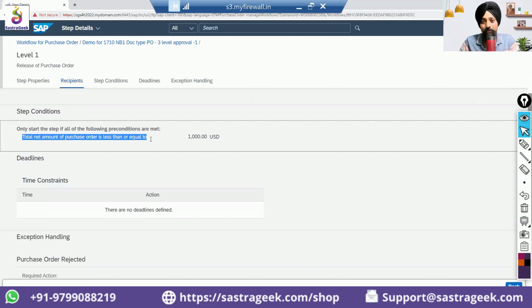That's why we are following a staggered approach: implementation with consultants. After implementation, for 1 to 2 years, not the release strategy, but they just need to create a change request, and once the change request is approved, the support team would immediately do the change and it will appear to them. And then after 1 or 2 years, once they understand it and once your approval process has been streamlined, then you can hand it over to your core user to maintain these applications.